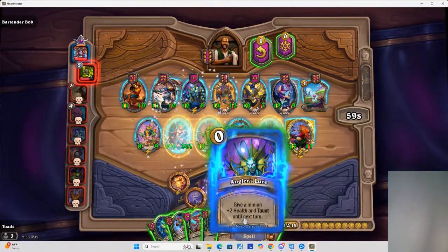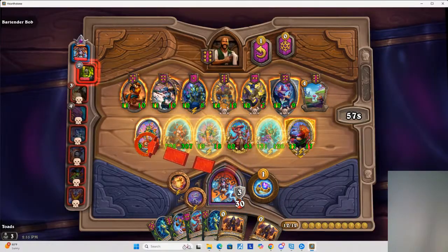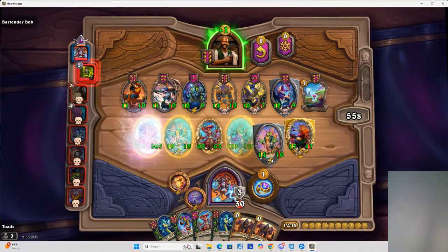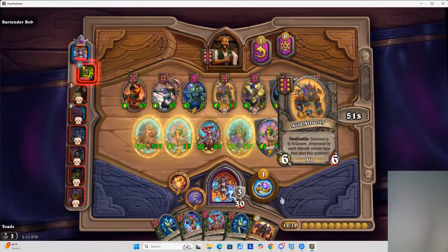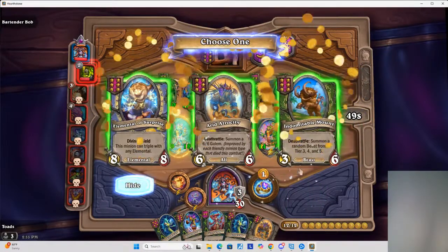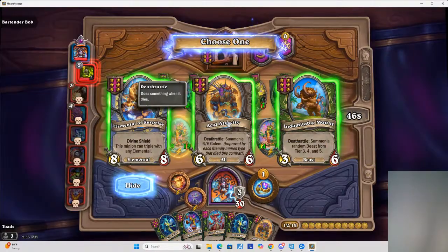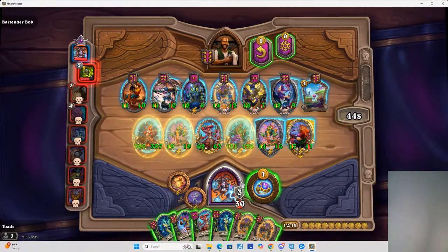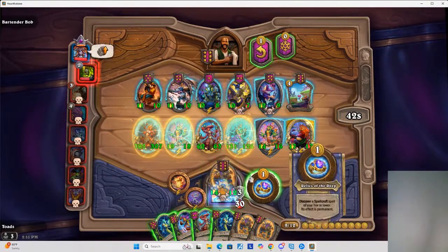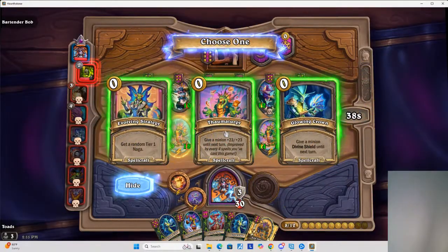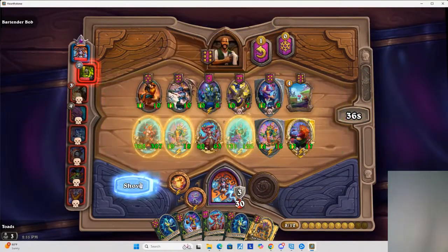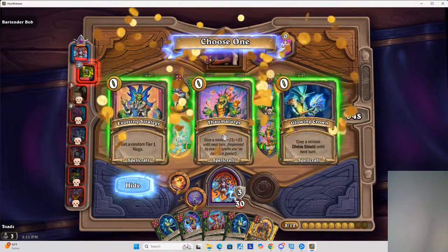The project schedule is a big part of your project plan. You put the tasks in the order that work has to be done. Add in your time estimates, and you can figure out when tasks should occur and how long the project should take. Some tasks have to be done before others can start. For example, you'd better build the first floor of a building before you start the second floor.